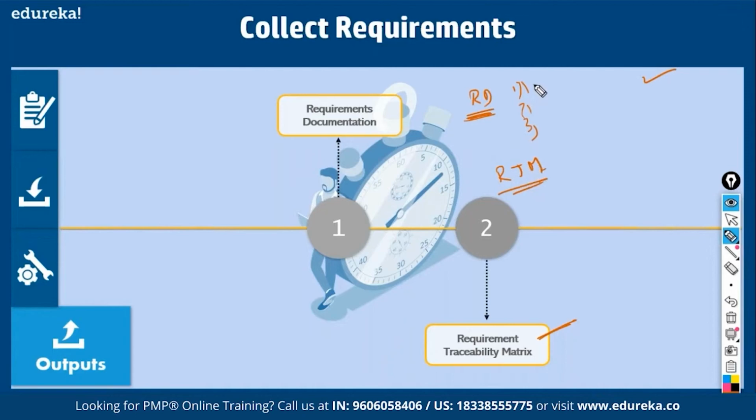You have to map the requirements to the high level business need, that is, you want to be the market leader. Then you map this to architecture drawings, then database procedures. Then for this prototype, you would have done a lot of tests: test cases, test scenarios, test conditions, test results. You have to map it through all these, and only then you're going to sign off. That is called a requirement traceability matrix. So when you collect requirements, you also stipulate the template in which you'll demonstrate compliance with requirements to the stakeholders later on, so that you'll get a formal acceptance.